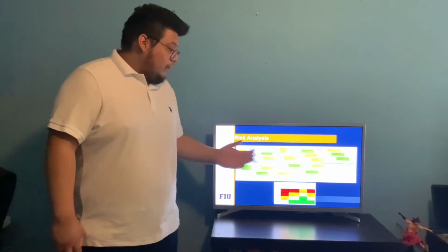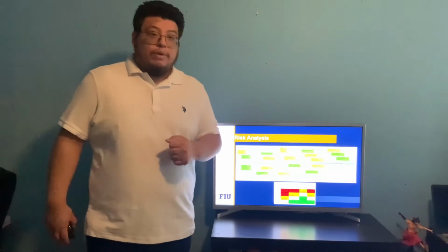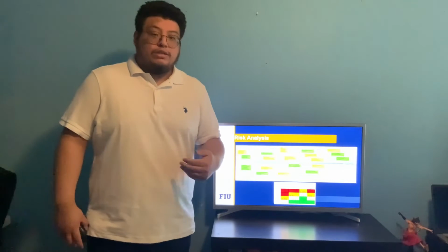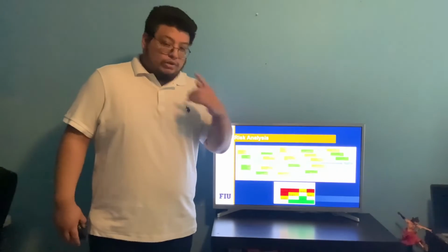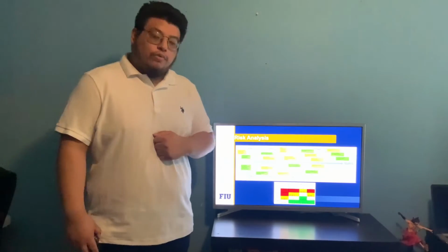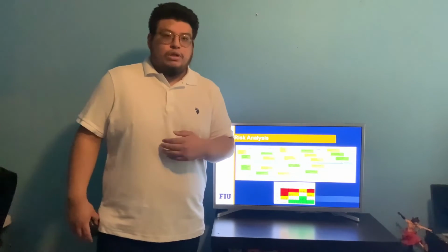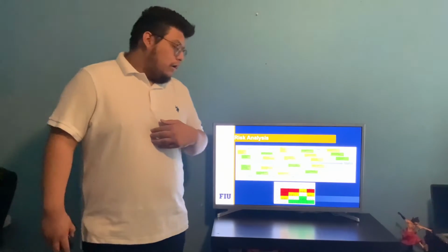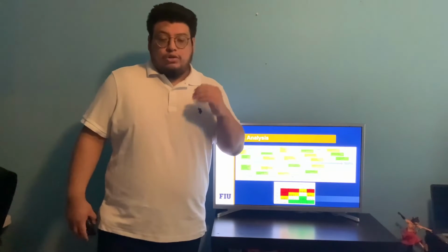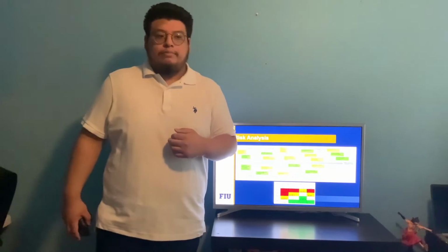For the risk analysis, we have a Fishbone chart and a risk threat matrix. For the Fishbone chart, it goes in ascending order to the right, meaning the most important section that we discussed was the rightmost topic, which is schedule. We also made a risk threat matrix, which identified the likelihood and the importance of each risk threat that we identified. It has different classes. Each class, in ascending order from class 1 to class 4, indicates the amount of monitoring that each risk requires.